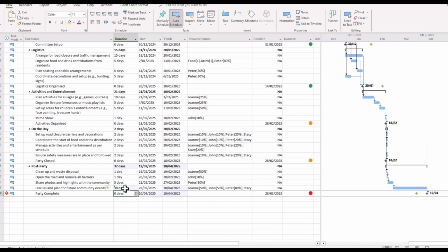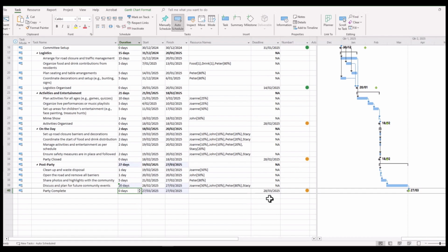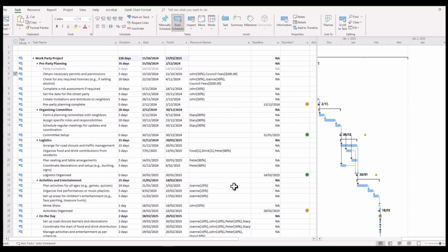We're still behind schedule, so we might need to give it some more tender loving care, reduce it to 20 days, and there we are, very close, 1 day prior to the deadline date. So as you can see, a very useful way to show how project progress is coming along, a quick and easy way to share a greater impact.